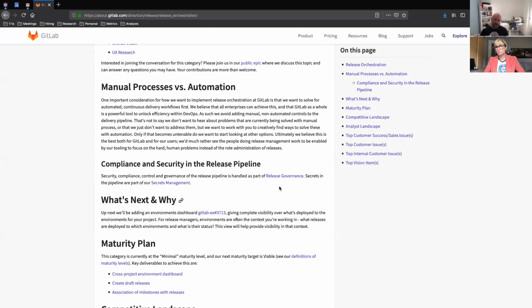So what we ended up doing is implementing that feature as approvals in the merge request, but only enforced later during the pipeline. So it creates a hybrid solution that release managers and change managers can be happy with, because it's enforcing the approvals that need to be there, but it's also not putting a pause in the pipeline, because those approvals can be collected earlier in the normal development cycle, as needed.